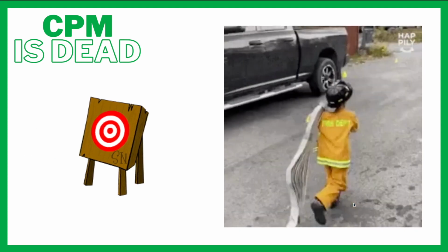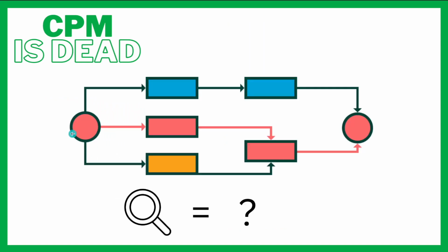So it helps us to just keep firefighting. Well, this path right here is the critical path because these take the longest. Well, guess what? If blue pushes, blue becomes the critical path and it pushes longest. So now we focus on this. And what happens is we start firefighting because the only thing we're really hyper focused on is the critical path. But yet everything can become the critical path.